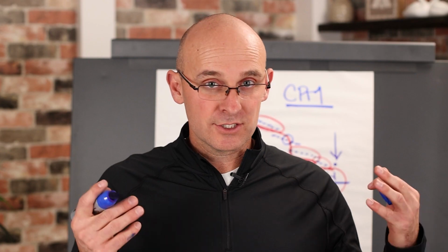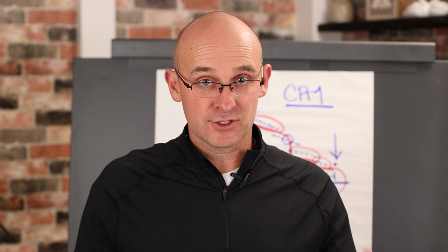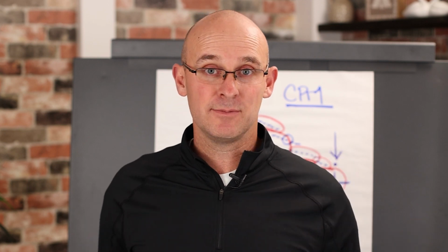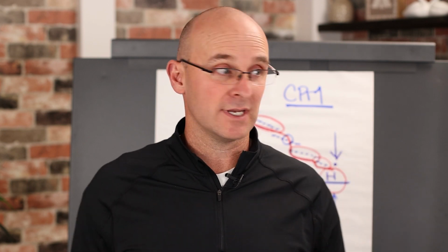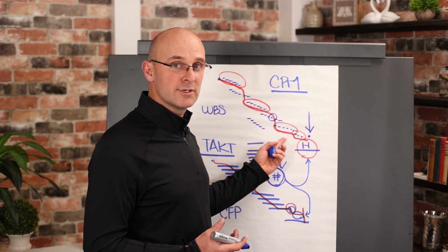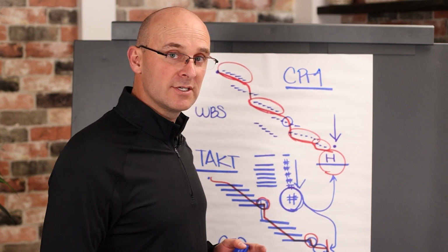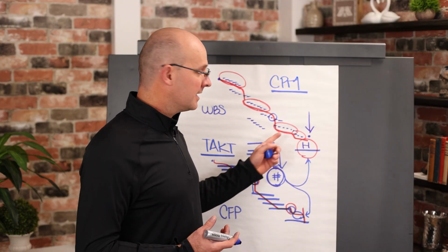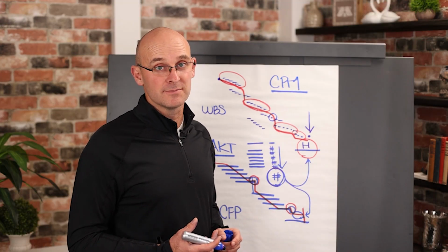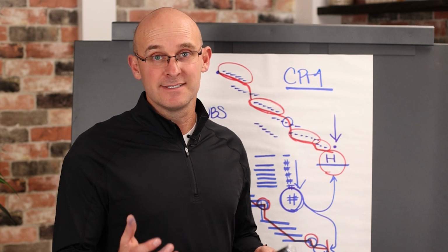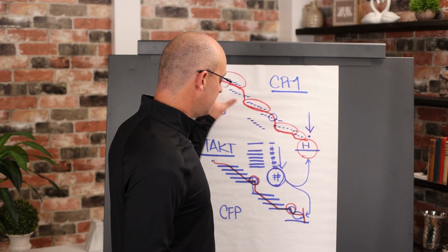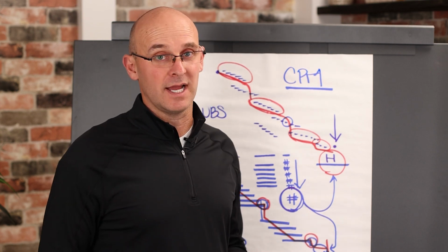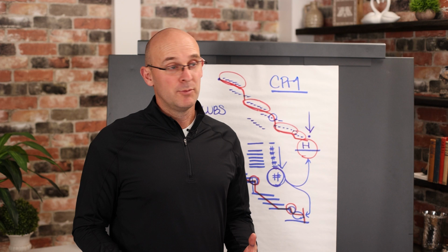Don't let it be. There is no such thing in construction, from a logical standpoint, as only allowing for a time extension or financial compensation if it's on the critical path, because this critical path will change. It's a projection and it will change 3 or 4, sometimes even 50 different times. So you can't let yourself get into a contract like that. And so my point here is this. You're not from this video going to be an expert at CPM. You from this video are not going to become an expert at Takt. We will link you to cool videos, but you're not an expert.